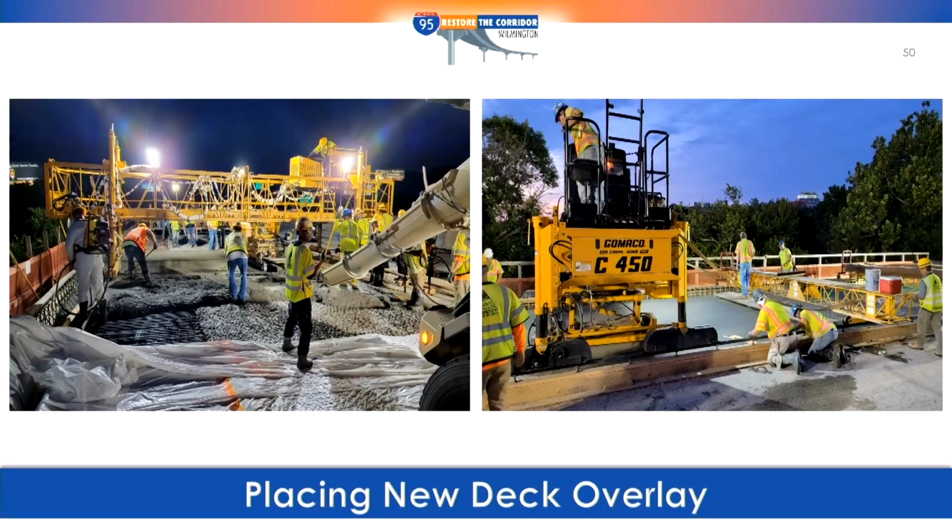Just a couple shots of them. They had a pretty well-oiled machine as far as having the hydro section, SSD, and then their whole methods of how they did it, pulling off the poly just before they went to place it, and then getting wet burlap on it ASAP to start the wet cure.